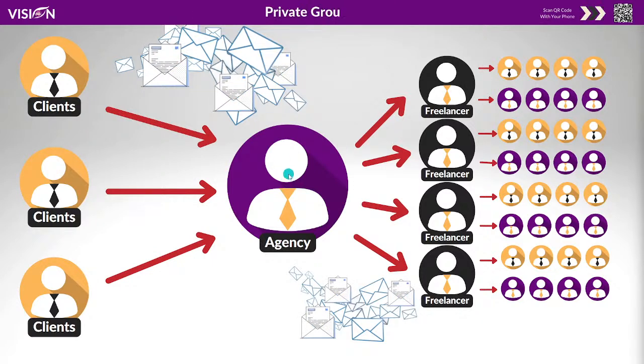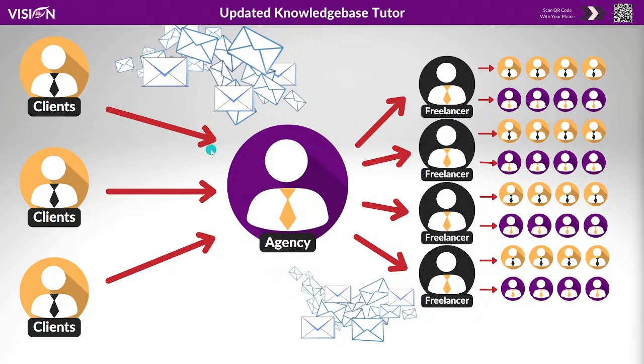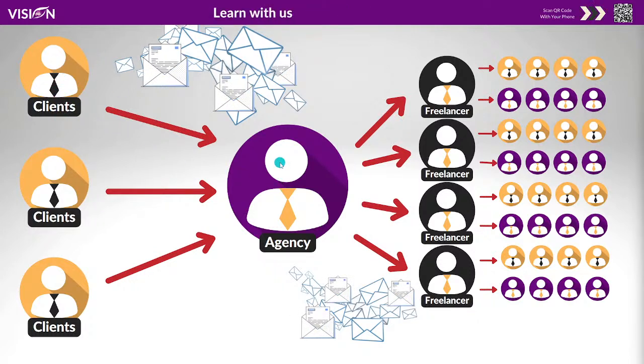So let's say that your freelancer here says, look, I'm going to do all of this website, but here's the structure, and I need all changes done in one email. Okay. So I require this as well. This is really, really important. All right. So one email to send to the freelancer. Well, you now need to require that from your client. Okay. So if your client here, say Billy Bob, you've created a plumber website for him, and you sent him the first mock-up, and you said, hey, Billy Bob, here's the first mock-up.